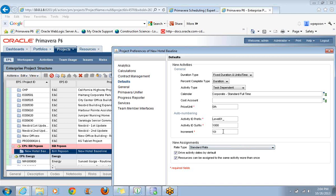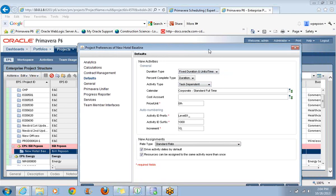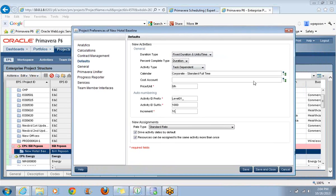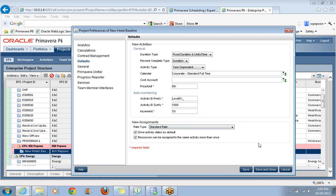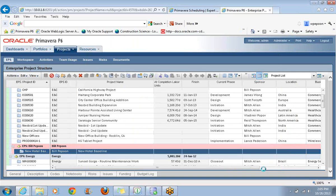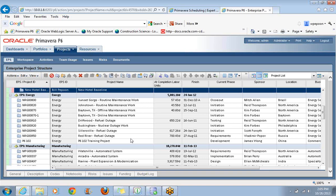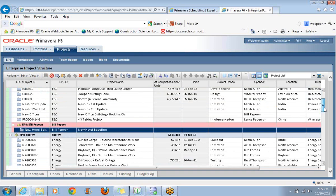I'm going to talk about how we set up the calendars. When you're creating a new project, naturally it makes sense that you want to have the calendar situation worked out pretty quickly. I'm going to come in here and give my project its own prefix. I've got a fairly long prefix called Level 01 to indicate the first level. I'll keep the suffix of 1000 and the increment of 10. We want to leave room for adding additional activities. Because this is web-based, I have to remember to save those changes.